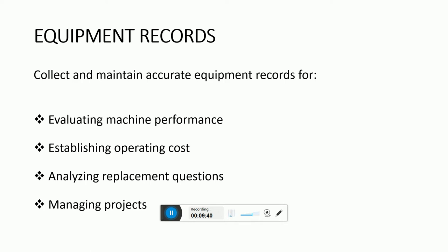As a minimum, data should be collected on a daily basis to record whether a machine worked or was sitting idle. A more sophisticated system will seek to identify use on an hourly basis, accounting for actual production time and categorizing idle time by classifying it as standby, down weather, or down repair.